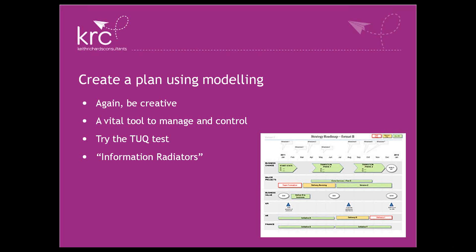Remember, in the DSDM community, Principle 8 is the idea of demonstrating control. And very importantly, if you can't do that immediately and you can't do that visibly, then you're not in control, is what DSDM is saying. So trying to get your plan visual and using a model is a challenge, but again, I think you'll find if you could get something on the wall and it's visual and attractive, you'll get an awful lot of benefit from it.